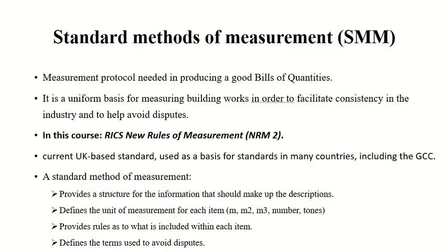So I told you when you are doing the stirrups, the quantity of stirrups, the bending can be ignored. But in beam, we don't ignore it because of the dia. So who is making up these rules? Me, right? No, they are coming from the standard. They define the terms to avoid any disputes.